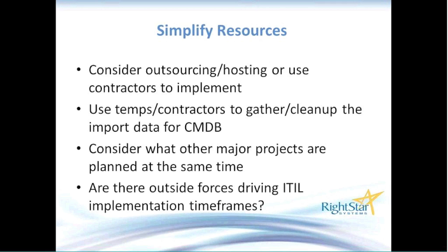Some of the mundane things that you do, and I mentioned that CMDB, setting up the CMDB, is pretty resource intensive. So I've seen accounts that use temps or contractors, or even, let's see, what do you call them? I forget the term, but the people that are there during summer out of college, interns, thank you. So even interns can be used to do some of the mundane things, such as clean up the data that you're going to import into your CMDB. So consider those things to help augment the limited resources you have.